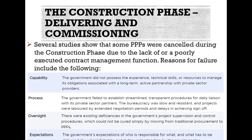Several studies show that some PPPs were cancelled during the construction phase due to the lack of, or poorly executed, contract management function. Reasons for failure include: Capability — the government did not possess the experience, technical skills, or resources to manage its obligations associated with a long-term active partnership with private sector providers; Process — the government failed to establish streamlined, transparent procedures for daily liaising with its private sector partners, with bureaucracy that was slow and resistant, and projects labored by extended negotiation periods and delays; and Expectations — the government's expectation of who is responsible for what and what has to be delivered by when failed to match the understanding of the private sector.